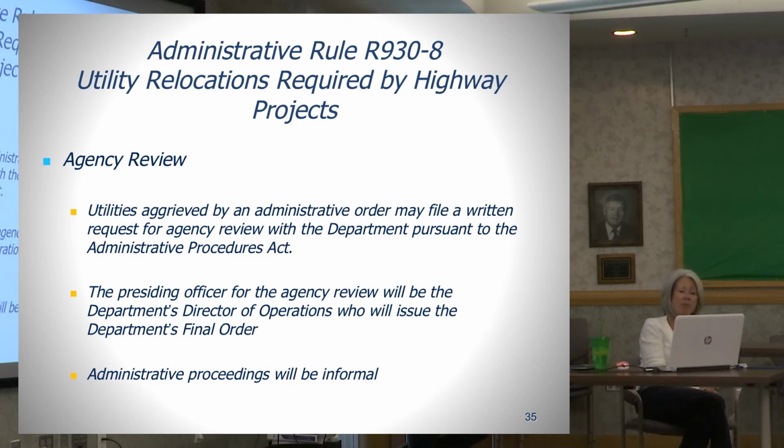So the department's going to be in a position where they're going to have to evaluate an excusable and compensable delay from the contract standpoint and separately from pursuing any remedy or cost reimbursement by the utility companies for those. So it's kind of two different processes we're going to talk about a little bit more when we get into the project discussion.